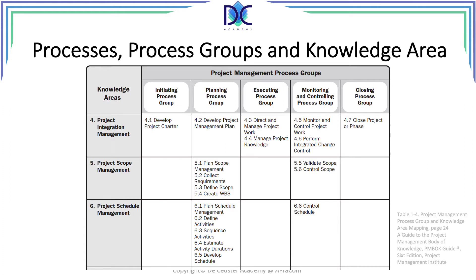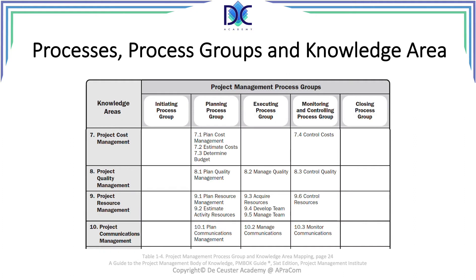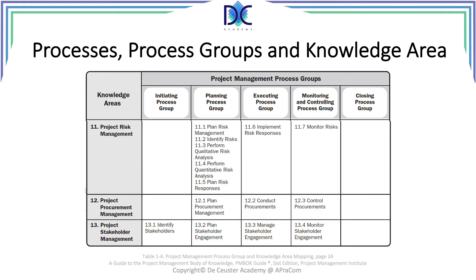In this table you can see what work has to be done during which process group. We can identify very logically how we go through the project step by step. For cost, quality, resource management, and communications management there is nothing in the initiation group and nothing in the closing group. The planning process group has processes from all the knowledge areas. For stakeholder management, we identify stakeholders at the very beginning.